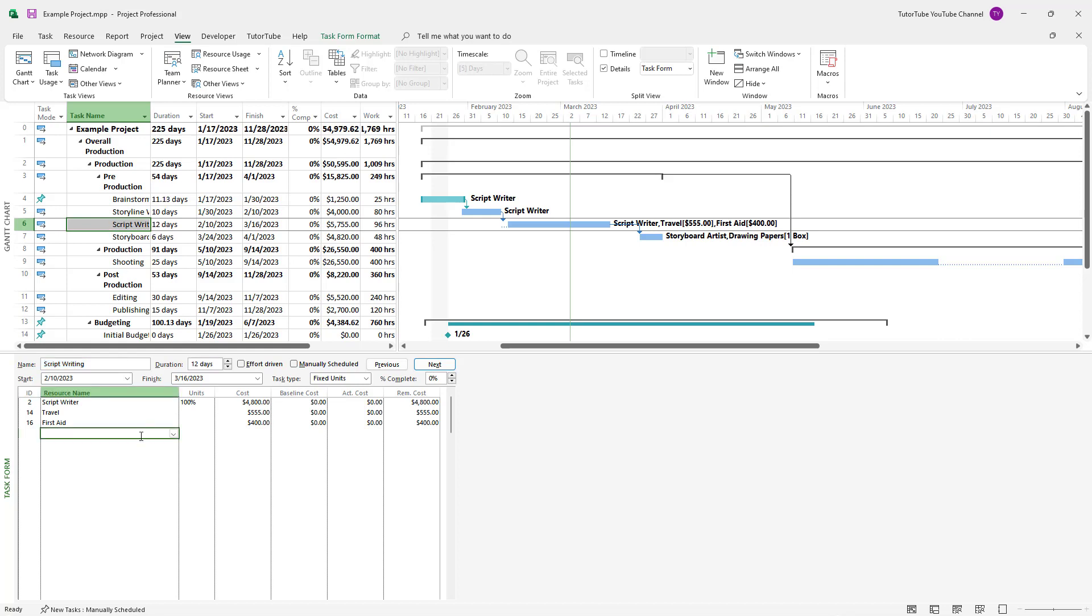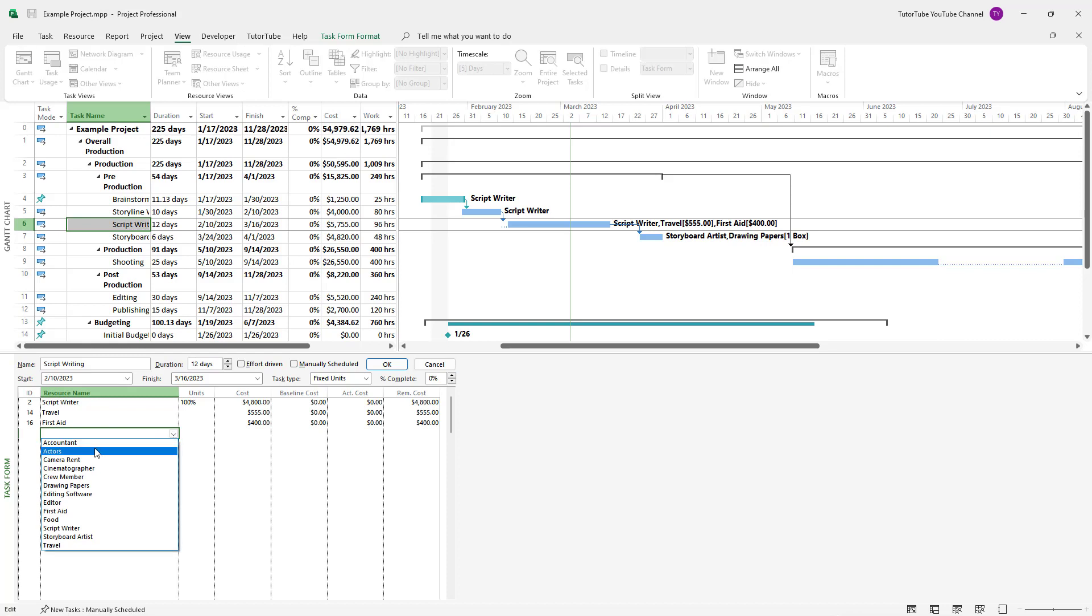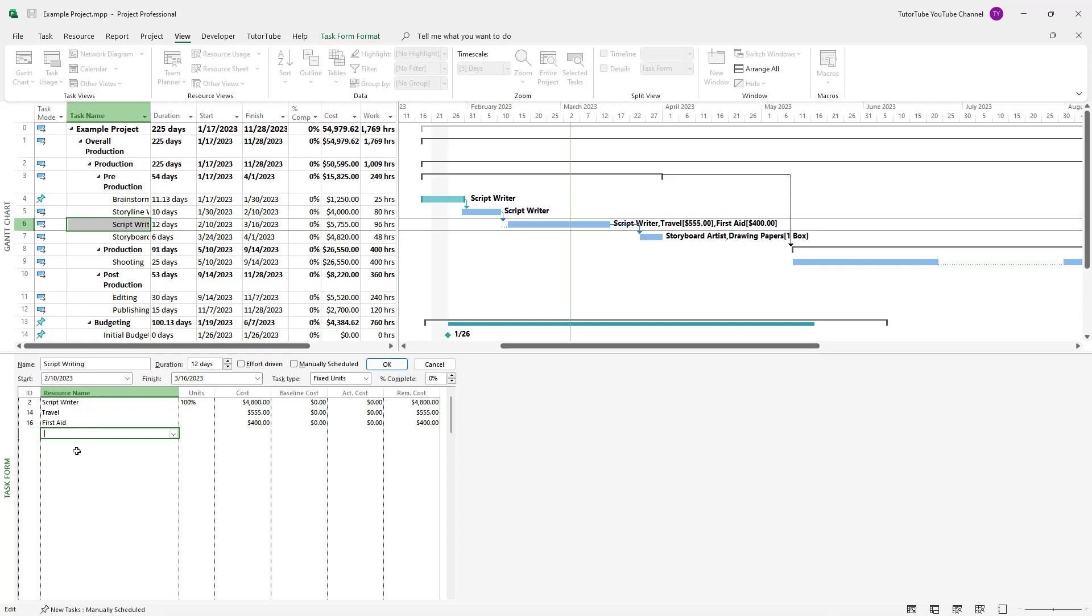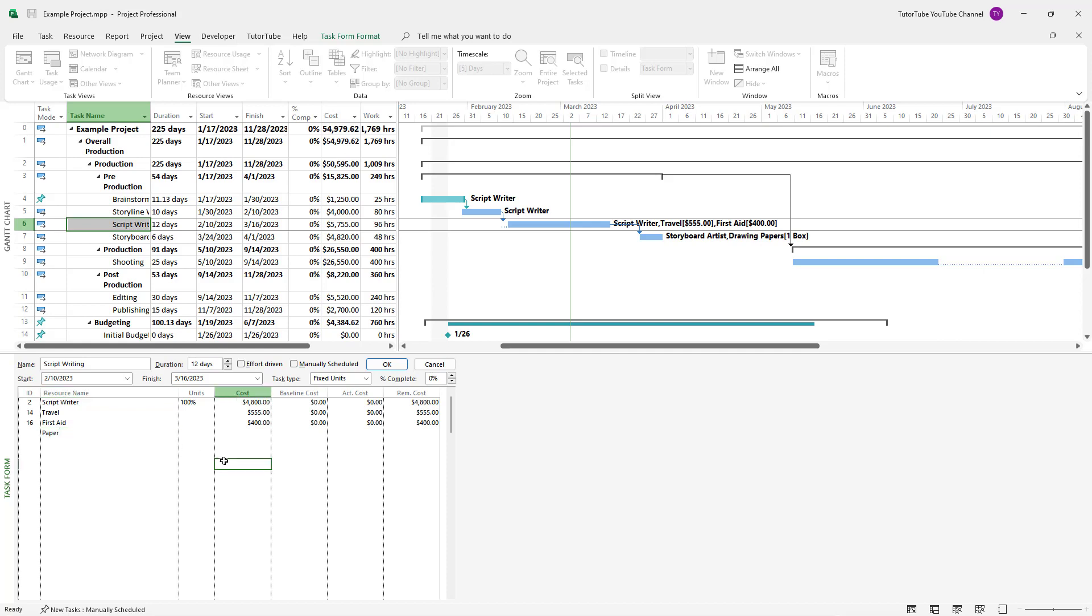Let's say I want to add something else. You can go to the drop down menu and here you can see there are many options. But let me type in something like paper, which does not actually exist in the resource list. Once I do that and press OK, you can see that the resource has been added.